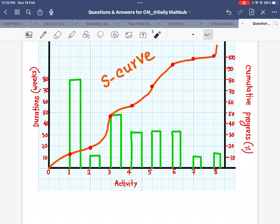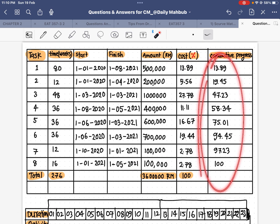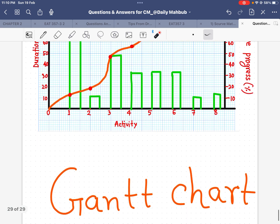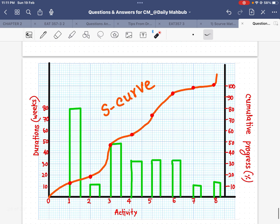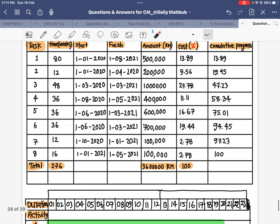For the second activity it was 19-point-something. You can refer to the table to get the cumulative progress for all activities. Once you input all the information for all activities, you connect all those points and you will get the S-curve. So that covers how to draw the S-curve and the Gantt chart using this information.